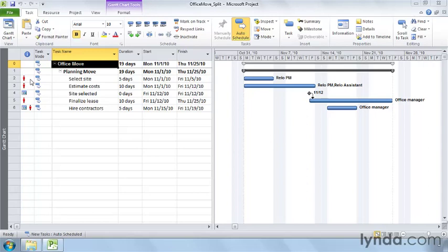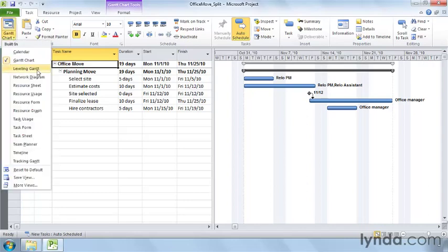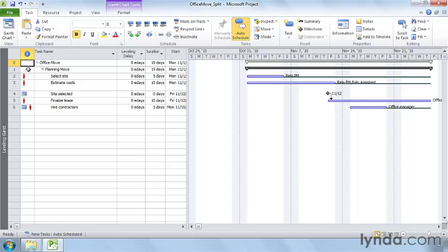The Leveling Gantt view makes it easy to work on task delays. On the Task tab, click the View drop-down and choose Leveling Gantt. The table in the Leveling Gantt view includes the Leveling Delay column, so you can enter leveling delays. The leveling delay moves the start date out for the task and all its resource assignments. Because it's the same field that the Level Resources feature uses, it's specifically for removing resource overallocations.